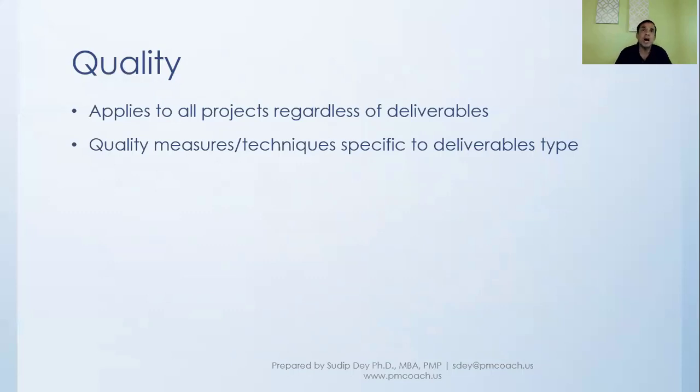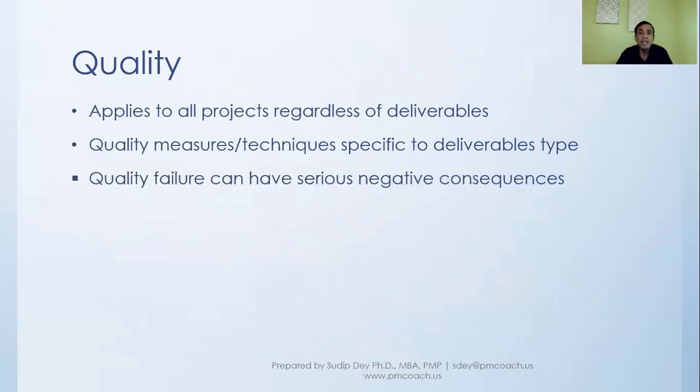Whereas if we are doing a construction project, we might have a test for the strength of the column or some other kind of non-destructive testing. And for example, if the project is to design a car, a new model coming out, then we might even take it for destructive testing. So the kind of testing that we'll do will differ from project to project, from deliverable to deliverable.